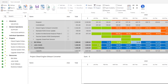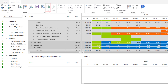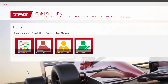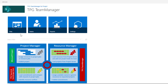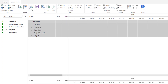We are about to end this functional manager's tutorial of Team Manager. If you're using Microsoft's PPM solution with Team Manager, you will want to communicate your updates with respect to the project commitments to the respective project managers. To do so, simply click the Publish button, which also saves your changes, and then check in. With Team Manager, you can also have team sites set up that consolidate the various teams in your organization. These sites work in exactly the same way except that they provide read-only access to the Team Manager data at the team level. No resource names will appear, providing the user with an overview of some or all of its teams depending on how they have been configured.